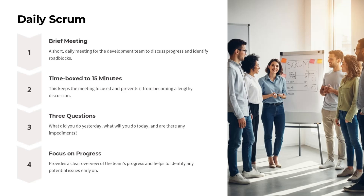The daily Scrum is a brief 15-minute meeting for the development team to discuss progress and identify any roadblocks. During the meeting, the team answers three key questions: What did you do yesterday? What will you do today? And are there any impediments? This format keeps the meeting focused and ensures the team has a clear overview of progress being made. By identifying issues early, the team can address them quickly and maintain momentum on the project.